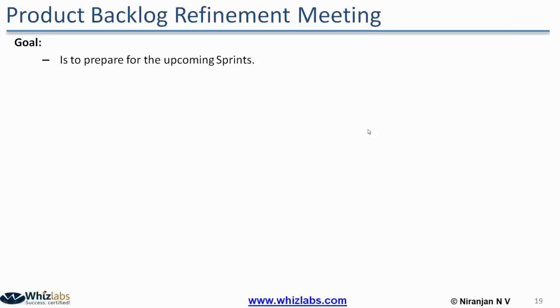On-site, offshore mode, if you do it, I think the effectiveness gets reduced. If the teams are distributed in two different locations, I would suggest there should be separate location-specific daily Scrum meetings. If two groups are located in two locations, okay. But maybe if one of the team members is offshore, he can join. But if the team members are split, I would suggest they have their own separate daily Scrum meeting according to what activities they do. So I hope it's clear to you, Hemant.